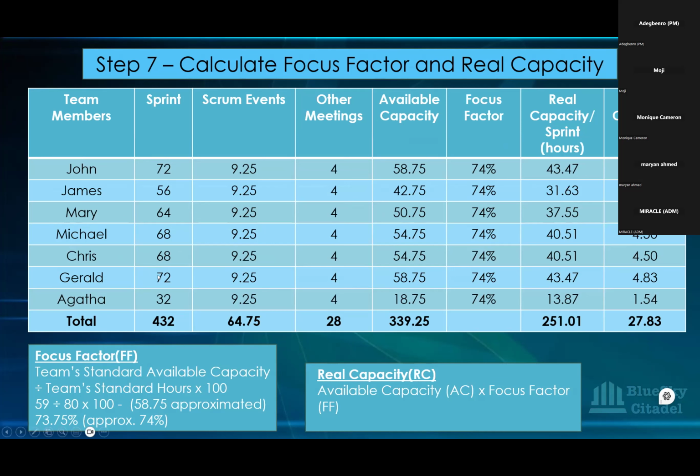Gerard also didn't take any day off, and that's why we're using that. So it's not as if, oh, you're using John to judge. We're not using John to judge. We've just looked at the 80 hours they've had, removed the 8 hours of the bank holiday, and we have 72 left. And we've used that 72 for everybody.